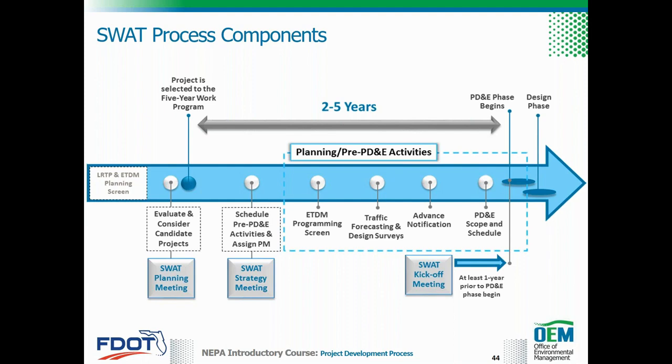The last meeting is the SWOT kickoff meeting. Each project that has a PD&E phase should hold a SWOT kickoff meeting at least 1 year before the start of the PD&E study. Districts have a flexibility of adopting or combining the SWOT kickoff meeting with existing district scope meetings,